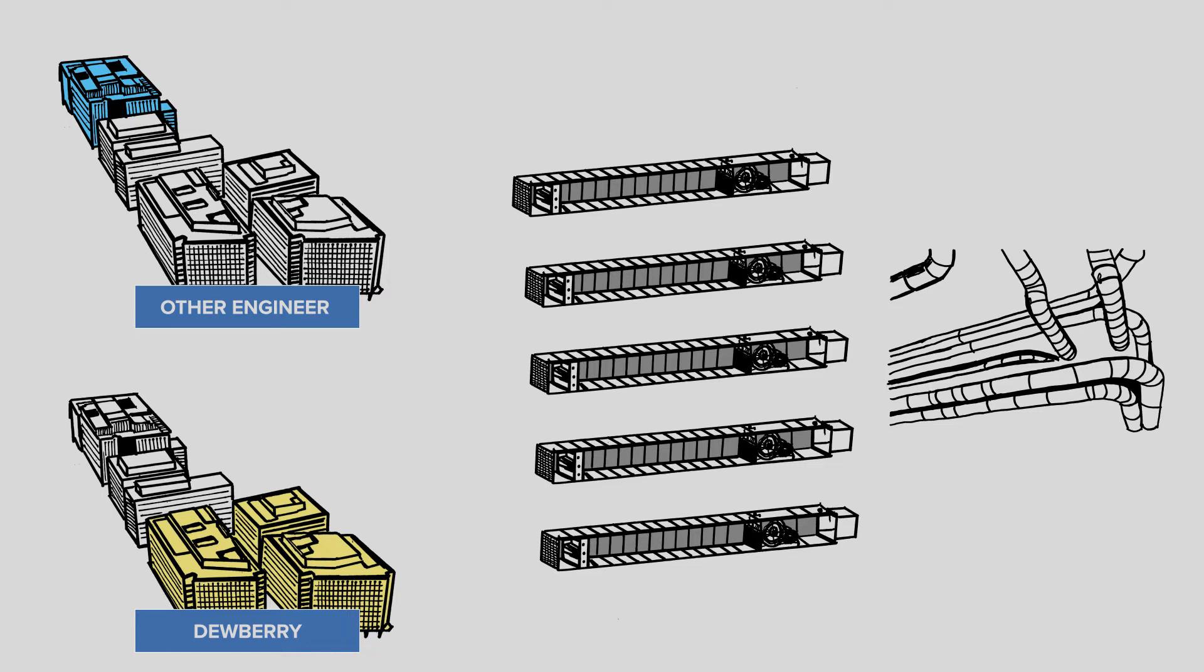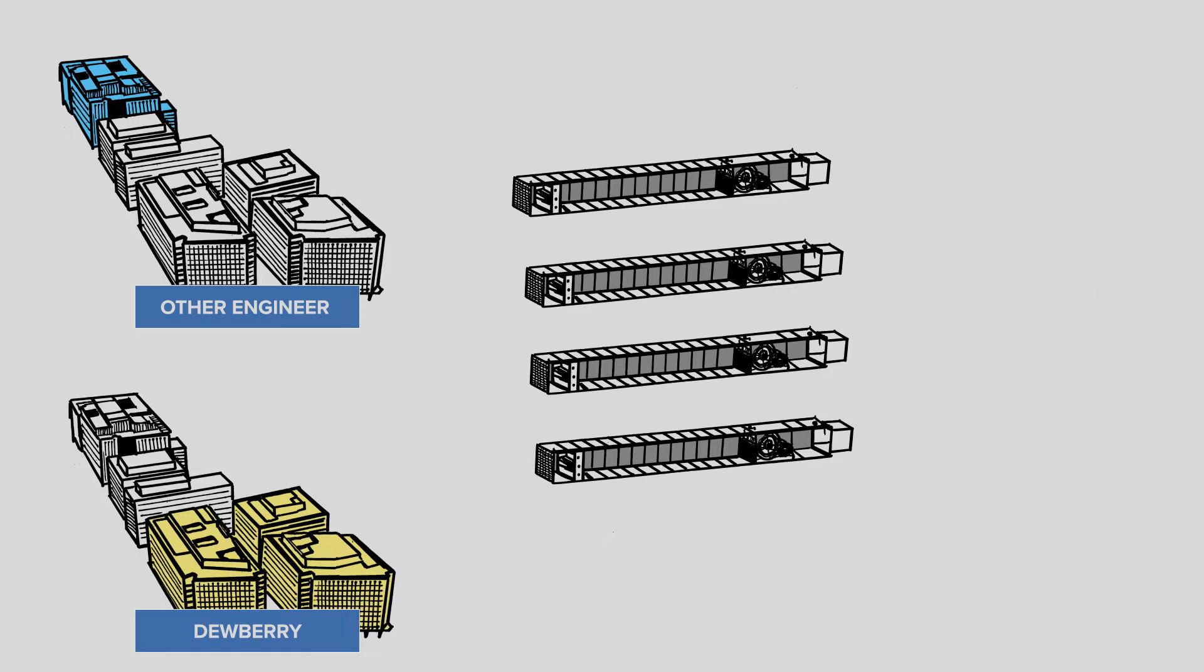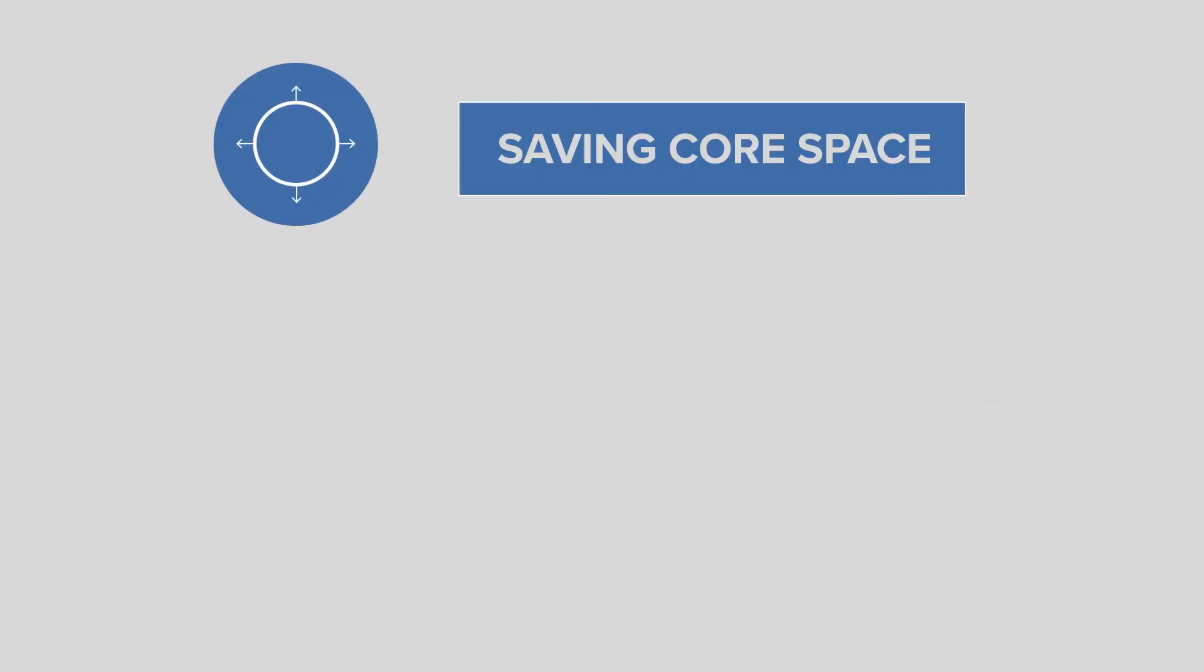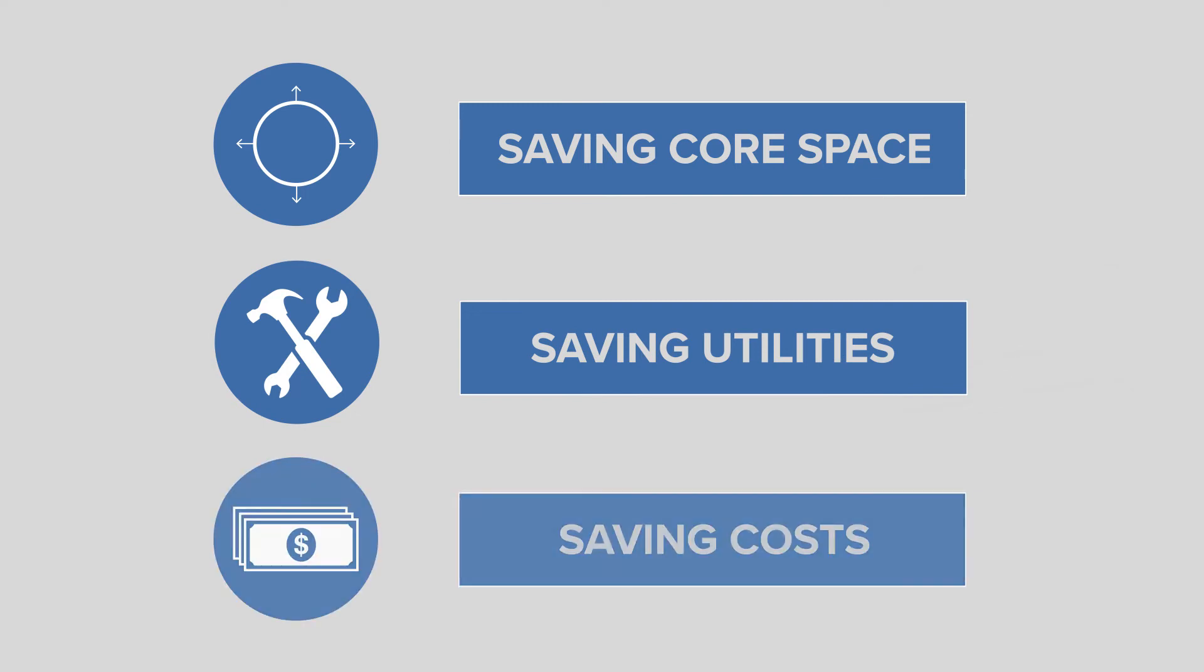We studied the program and were able to scale this requirement back to four air handling units and redesigned the mechanical system to eliminate all ductwork over the highway. This had multiple effects, including saving core space, saving utilities that would need to discharge over the highway, and of course saving costs.